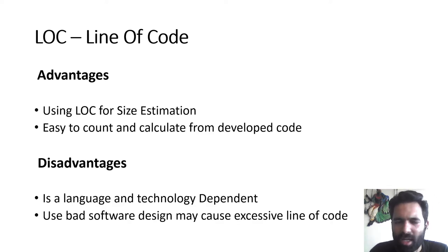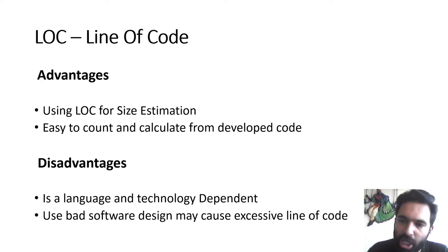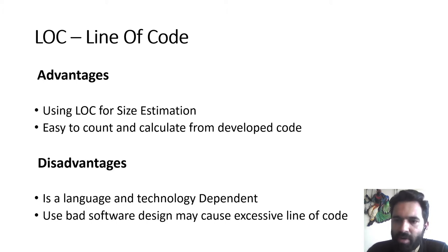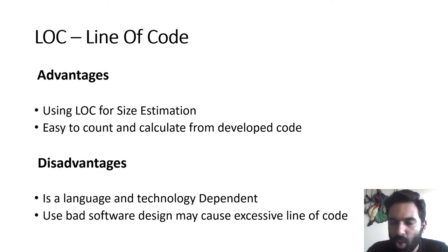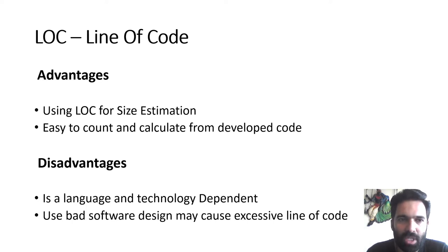The first advantage of LOC is that the actual size of the program can be calculated using it. The second advantage is that it is easy to count and calculate for developed code — that is, a program which is ready to execute and completed by the programmer. A disadvantage is that it is language and technology dependent; a specific language or technology must be used. Also, bad software that continuously adds more lines makes counting very difficult.